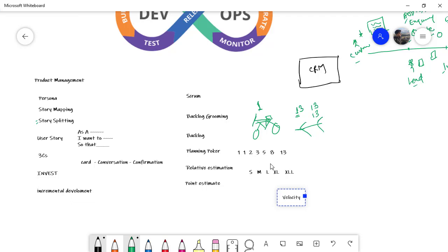If I pick up a story and say, hey, I can work on two stories, one for the accountant and one for the customer. The customer can log in, the accountant can print an invoice, and those stories are 2 and 3 points. At the end of the iteration, my individual velocity is 3. Suppose the entire team is working together on this application and they are finishing like 5 stories, then it is going to be about 20, right?